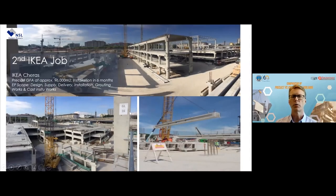The second IKEA job we did, typically, they're always about 100,000 square meters. Typically, less than 6 months construction. The next one we did was actually partially a basement. So it brought its own difficulties. Headroom issues in this particular building required us to change the layout around. Instead of having an 8-meter beam and a 16-meter hollow core slab, we put in a 16-meter beam, as you can see on the right bottom, and an 8-meter hollow core slab.